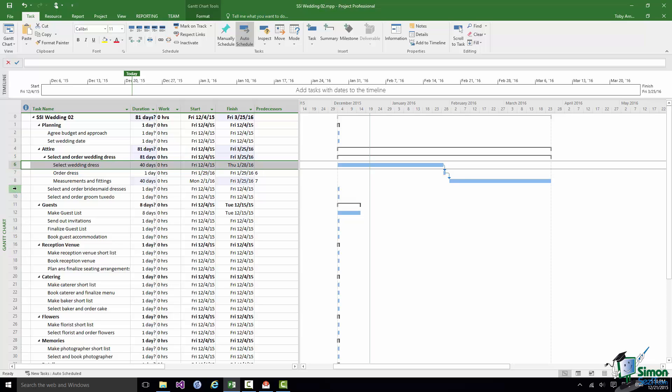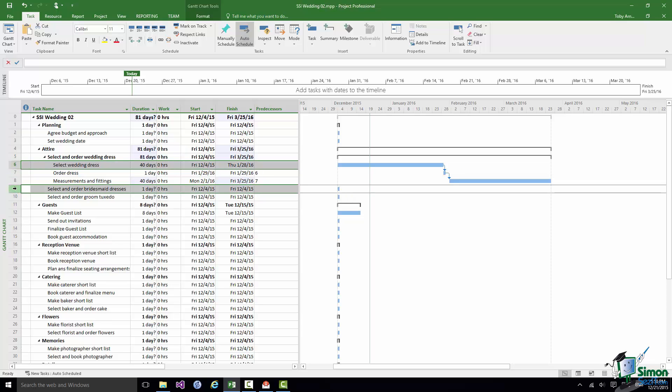Now in reality not only would Select and Order Bridesmaid Dresses itself be broken down into sub-tasks but even some of those sub-tasks would probably be broken down further. So for instance measurements and fittings would probably be broken down into two or three sub-tasks. But let's stick with the level of detail that we've got.